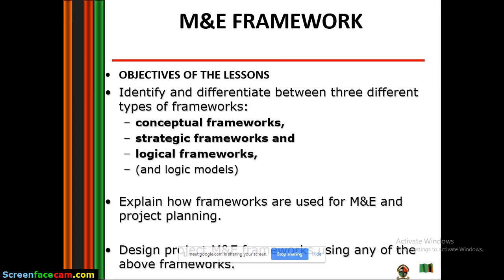So today, I want to introduce you to something that we call a monitoring and evaluation framework. The framework is what anchors monitoring and evaluation. Without planning premised on the framework within monitoring and evaluation, your project cannot be monitored, and it cannot be evaluated. You can only monitor what you've planned to be doing. You record them, then you can evaluate what you've done, and then you compare it with what you had put in your plan.